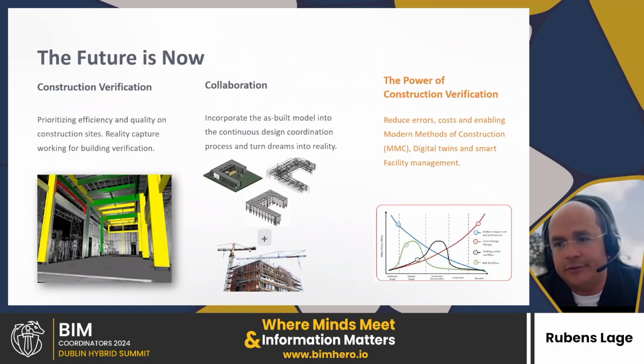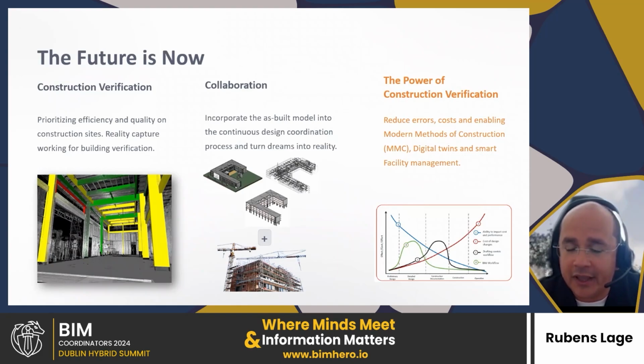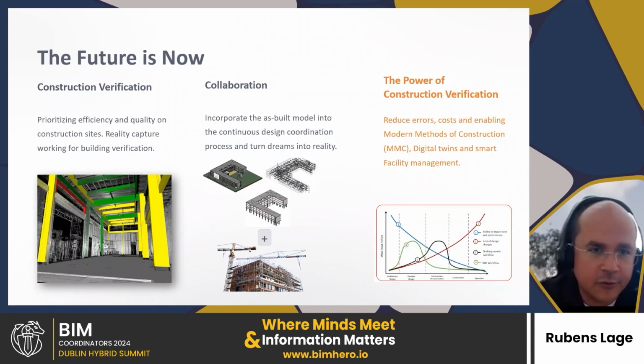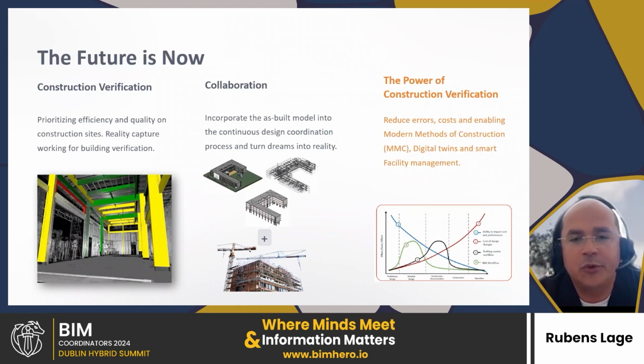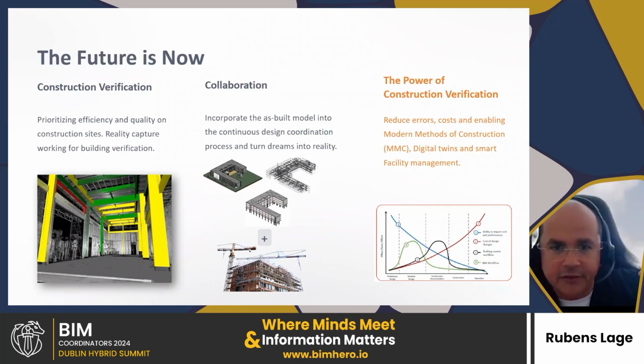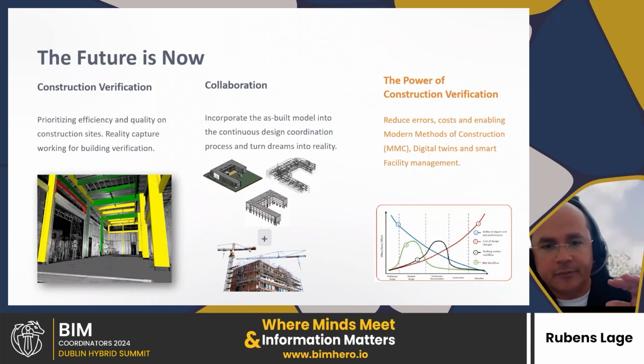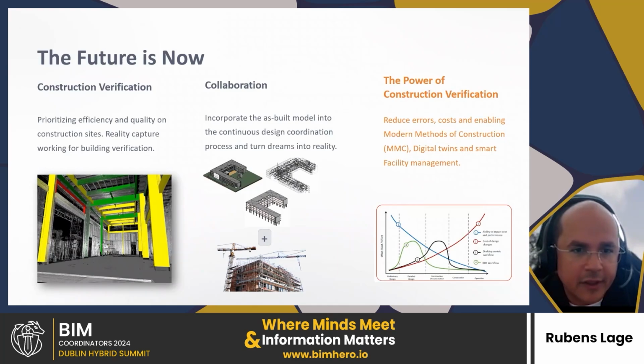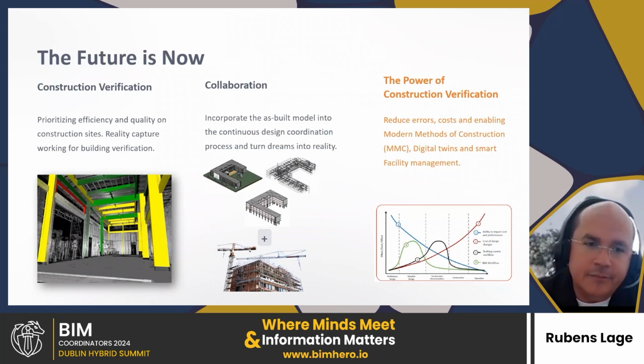And when you know exactly what's on site, that enables you to build using modern methods of construction, MMC. You can have structural prefabrication, MEP prefabrication, and that's offsite construction, which, as everybody knows, reduces risks of accidents. So it's better for safety, better for costing, better for the whole workflow, and gives you a better result as well.